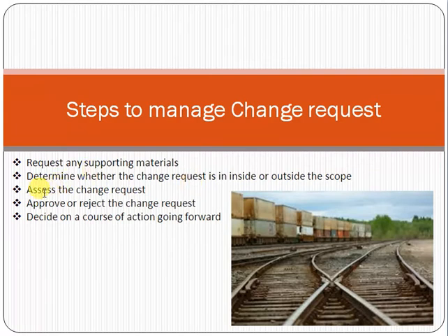After that, you have to assess the change request with the technical team: how much time is required, how much effort is required, how much cost will be incurred. As a project manager, you have to assess the change request in terms of effort, time and cost, and make a document.